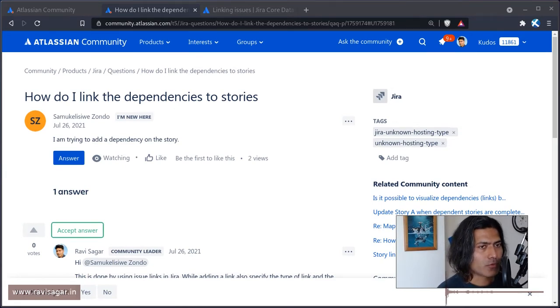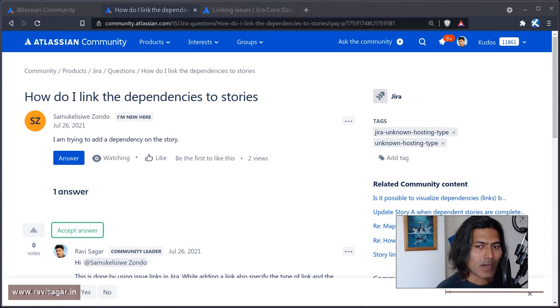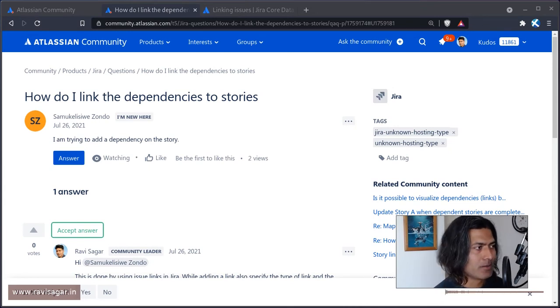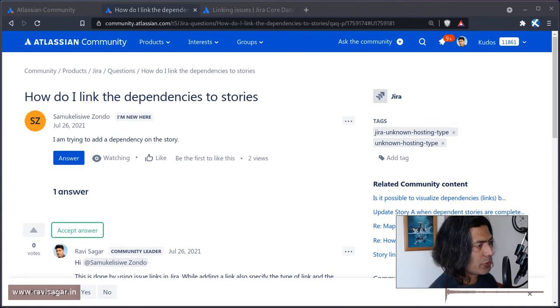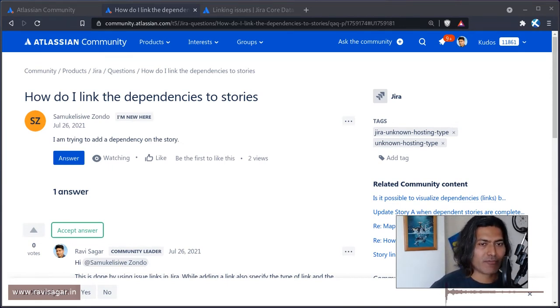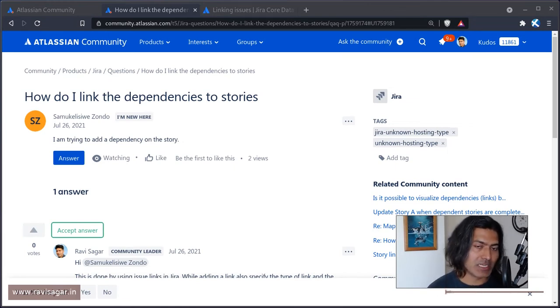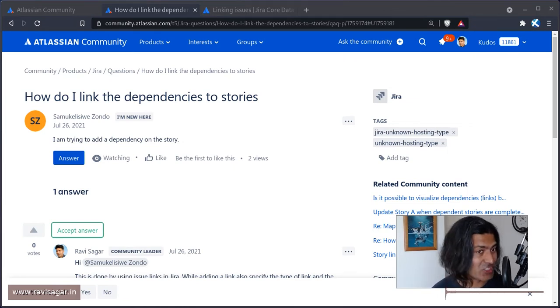And what I'm trying to share today is that Jira by itself will not handle the dependencies for you. I mean, of course, you can link two issues together. And when you create a link, you have the option to define and use the type of the link, and also the direction.